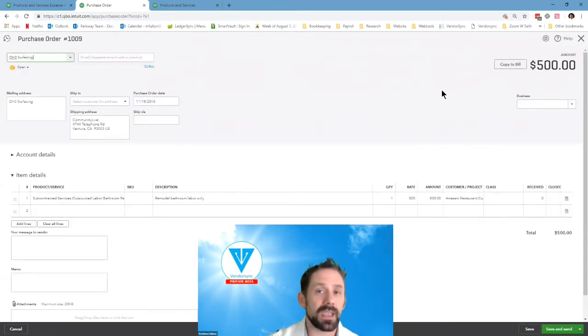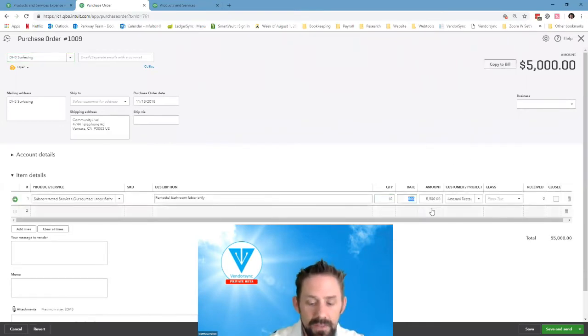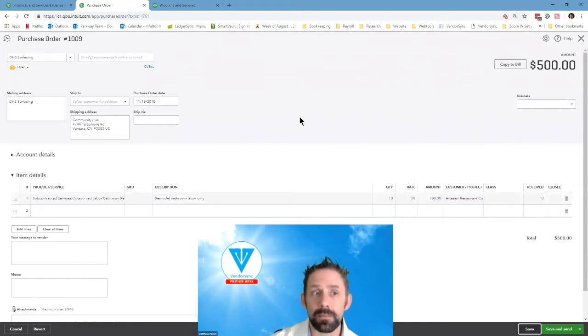Now that this has been saved, we're going to pretend a week goes by, whatever, 30 minutes, you get the approval. It's great. It's wonderful. And we know we can now create a bill out of this. If we click copy to bill, it will give us the ability to choose how much of this we actually want. Because I want to demonstrate how you can break up purchase orders into partial orders, I'm going to do something different. We're going to change this to 10 and this to 50, to give us the same 500 we had. So hopefully everybody followed that part. I'm going to save that purchase order still.